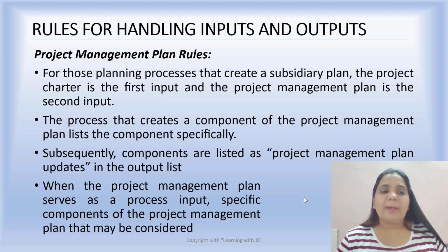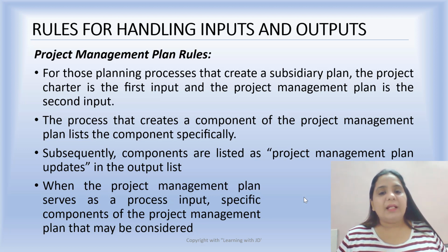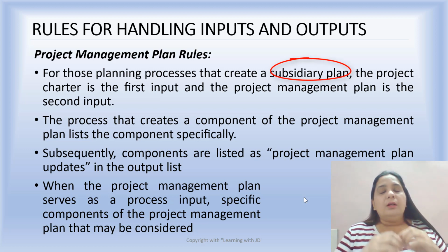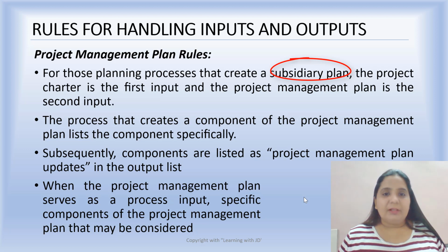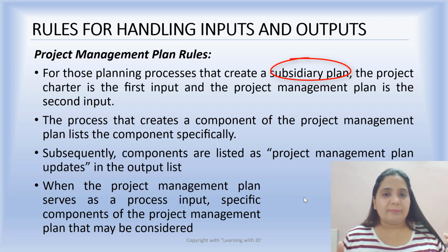Coming to project management plan rules. What are the rules for managing the project management plan? For those planning processes that create a subsidiary plan, each and every knowledge area creates a subsidiary plan. There are 10 subsidiary plans which are a part of the project management plan: your schedule management plan, scope management plan, cost management plan, risk management plan.